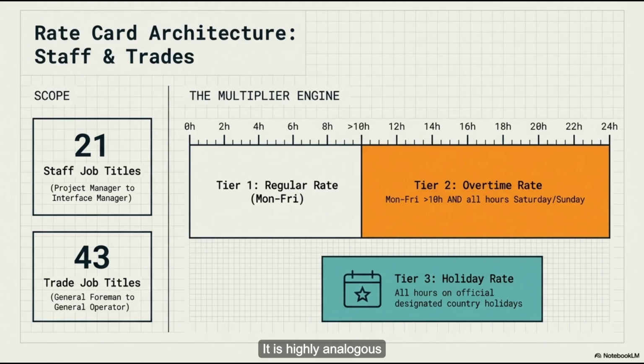It is highly analogous to renting an Airbnb. Hooray. But instead of a vacation home, it's an industrial diesel generator. That's a great way to put it. Every week that variation drags on, the meter is just running. Time is dragged down to the hour for a tinsmith and the week for an office trailer. Everything is quantified.